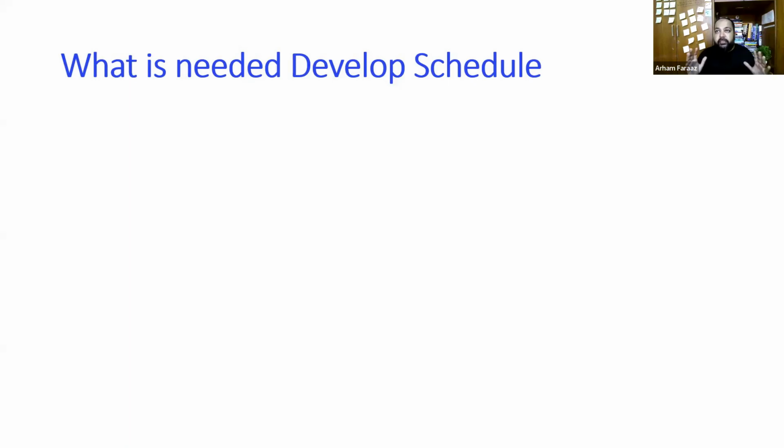You've seen so many things, like the work that we need to do. So we need the scope, right? Then after that, the list of activities that we need to do. We need the activity list, the activity attributes, right? And then after that, we need to know the resources. Like for example, a senior resource can do work faster, so shorter duration. So we need to have the resource breakdown structures, right? And then after team assignments, who's assigned on the team.